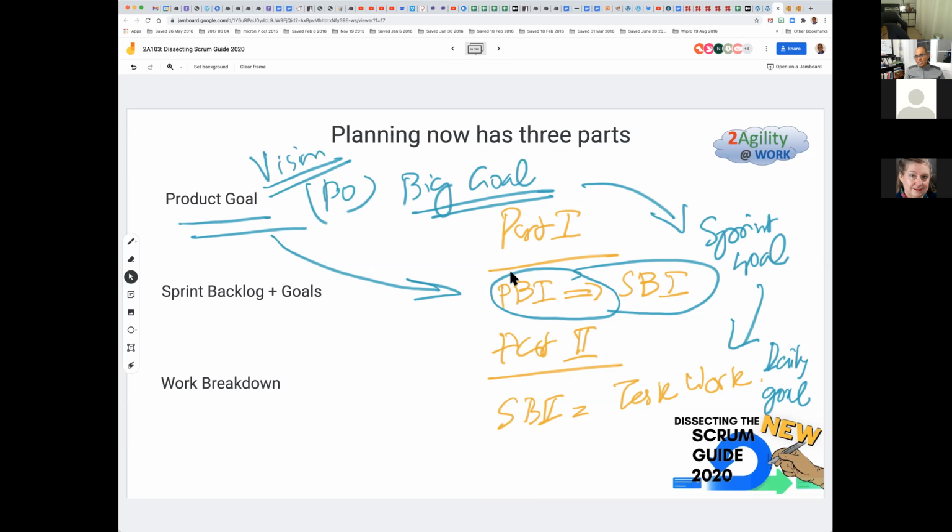And there are many of my teams who do not even do task breakdown. They know these are abstract sizes to do this work. This item is about 3 days, this is about 4 days, this is about 6 days, this is like a large, that's like a medium, and these are the 4 things that we are going to do. And they start jumping in and doing the work. In as little as 10 minutes, we have done all 3 steps of planning and then proceeded to do the work. Again, context matters, and the practices that the team practices matter.